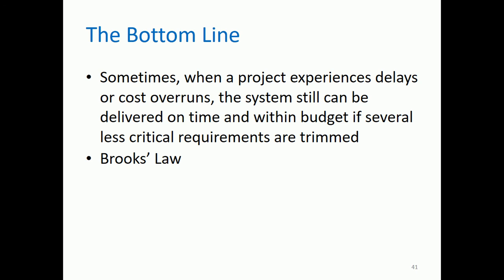And then, for example, you're going to assign them to different tasks. Of course, they're going to study it. It's not that in one instance they already know what they're going to do. Of course, they will study it first. So that's the reason why in Brooks Law, adding manpower to a late project makes it later: because of the time that will be spent for additional training and additional briefing for the new members of the team. It is better to add manpower at the beginning of the project, not in the middle or later before it will be finished.